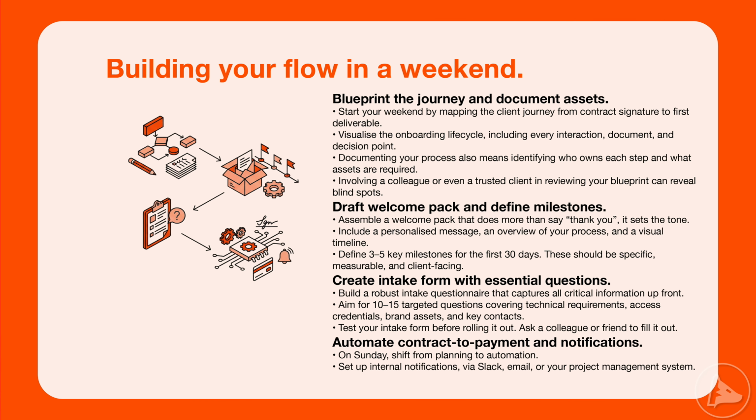Now let's build it. Weekend style. Saturday morning, blueprint the journey. Start by mapping the journey from contract signature to first deliverable. List every interaction and decision point. Welcome email, contract, invoice, intake, folder creation, kickoff booking, recap.